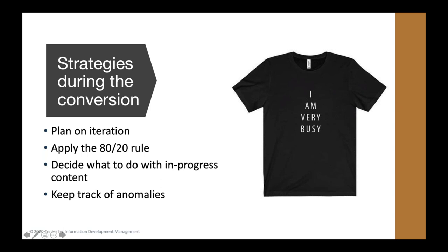Another important consideration is to apply the 80-20 rule. Before you ask the vendor to iterate the conversion software, try to investigate whether this is a one-off anomaly or truly a new data pattern. Determine whether it's more cost-effective and time-effective to have somebody clean up the one or two files that have problems in them than it is to change the software and have the resulting delay.